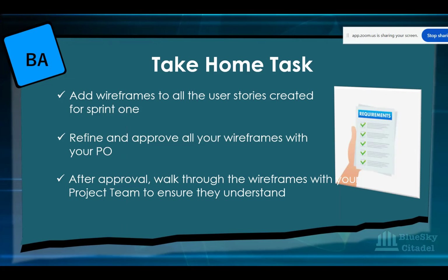So everything you need to say should be said before you pull up your wireframe. Once you're done saying everything you need to say, reading, remember, another thing BAs do is they start making explanations that are not in the acceptance criteria. That's another faux pas. Don't do that. Every explanation you need has to be documented. Why? Because you won't be there when the QAs are working. You won't be there when the developer is working. So anything you need to say, document it.